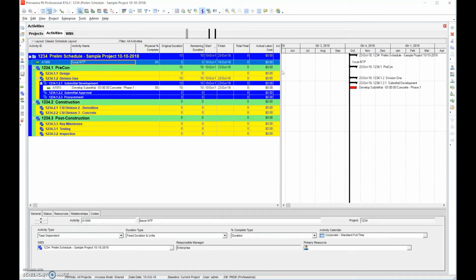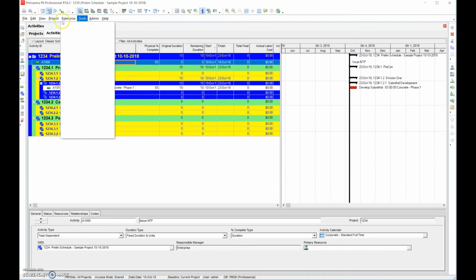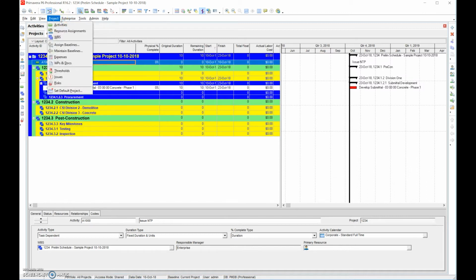If you can get people to show up and bring enough people, the chance of you being successful is pretty good. So I try to encourage people to create man days columns because it sets the expectations of what the crew size is. If we're going to create a man days column, because that's not a standard column that we'd create in a schedule, we would simply go in to develop an individual task, and that will let us assign or develop a column, per se.